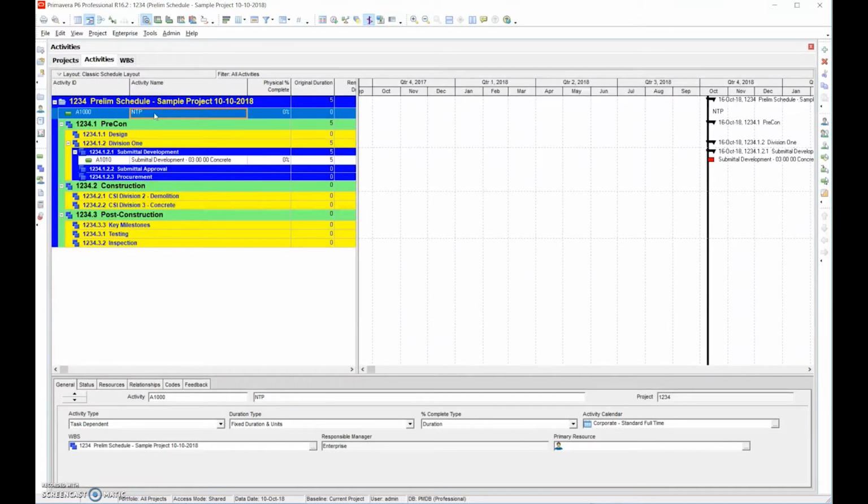I'll say it again: this is the most difficult because you have to understand how to read drawings. You have to understand how to read specifications, and you have to be able to develop tasks from those. What I find to be efficient and effective is to sit down and go through the drawings, spend 1 minute on each of them, and write down a whole bunch of notes of what tasks you see taking place. You'll see some pages with a whole bunch of tasks, and on other pages there won't be many. It just takes some skill in reading the drawings.